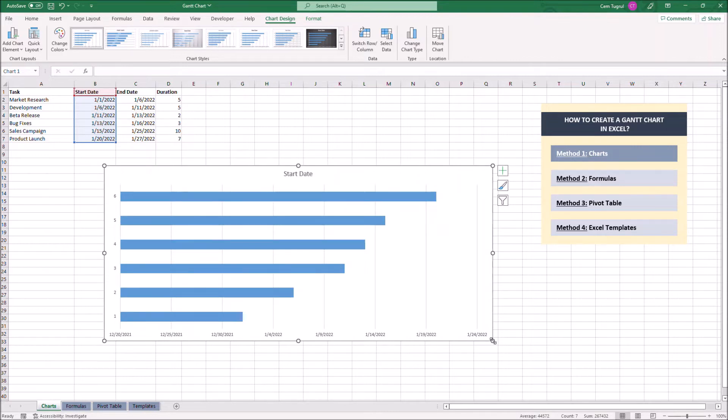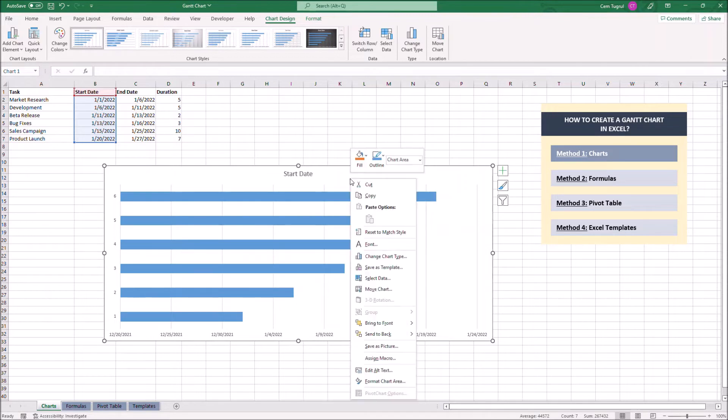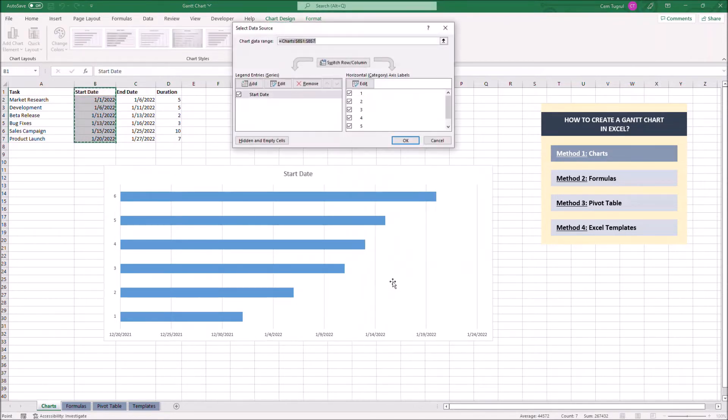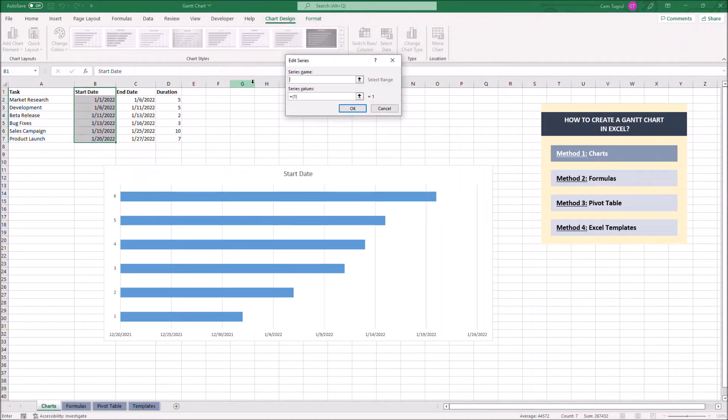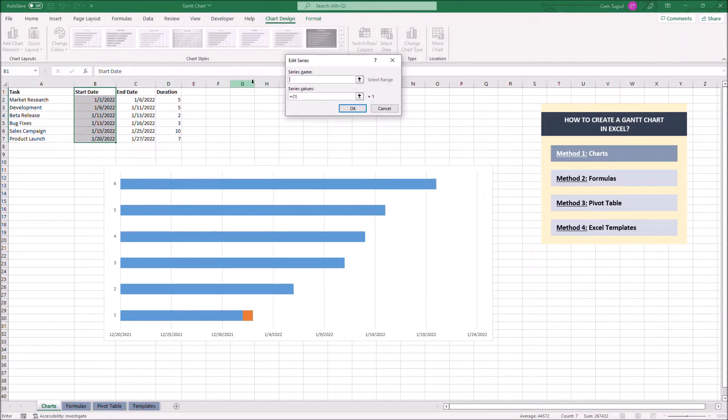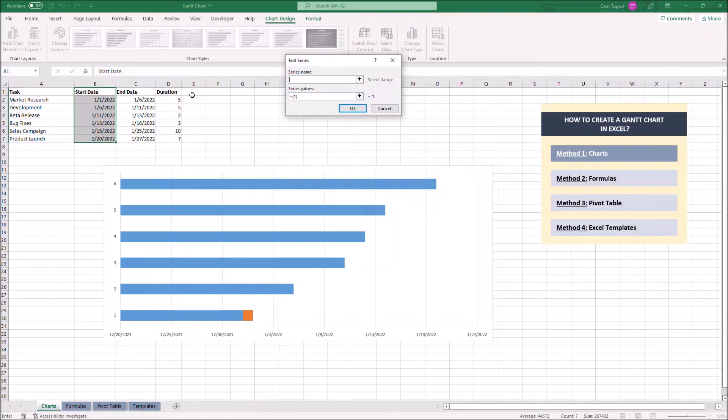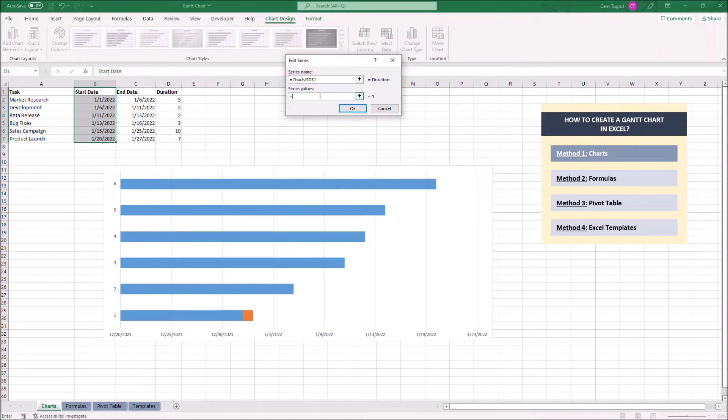Now we're going to choose the stacked bar. Now we want to include the duration data in the chart. So let's right-click on the chart itself, then click select data, click on add. Now we have to type duration in the series name section, or we can just click on the column itself. Now we can select the data located in the duration column.